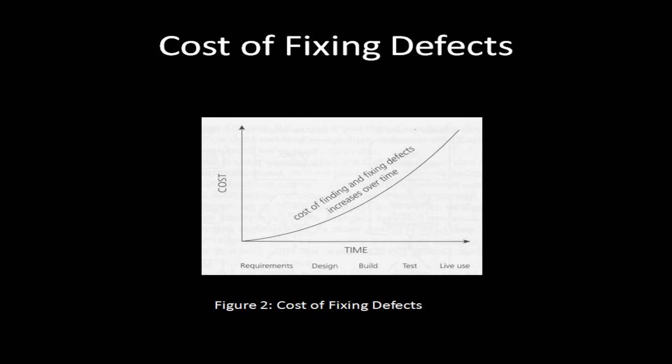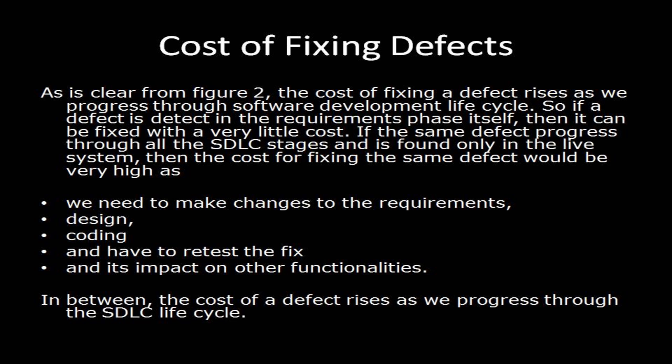If, however, a defect is introduced in the requirement specification, and it is not detected until acceptance testing, or even once the system has been implemented, then it will be much more expensive to fix. This is because rework will be needed in the specification and design before changes can be made in construction, because one defect in the requirements may well propagate into several places in the design and code, and because all the testing work done to that point will need to be repeated in order to reach the confidence level in the software that we require.